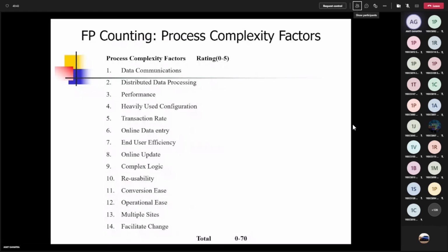One method is COCOMO. In COCOMO, you require input from LOC. Second is function point. Here you have to consider the number of features or functions. There are 5 things associated: number of inputs, outputs, inquiries, internal files, and external interface files. First you have to calculate the unadjusted function point with a weighted equation. Then you have to calculate TCF. This is where the degree of influence comes into the picture.